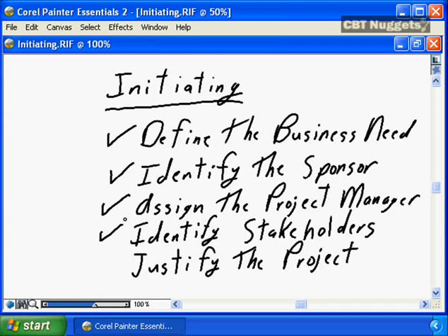Who truly would prefer to have this project not be initiated? Who would prefer to have the funds for this project diverted to their business unit? You need to go through and identify all of the stakeholders, people impacted by, people who can favorably support your project, and people who will potentially negatively support your project. Get those identified so you can start to take the appropriate actions during the initiation process to support and manage the supportive stakeholders and to manage and encourage the non-supportive stakeholders.